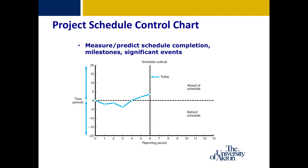Another tool used to track project progress, at least for schedules, is the Project Schedule Control Chart. The x-axis notes the reporting period being measured — in this case 13 periods shown. The y-axis notes the number of duration and time periods, which could be hours, days, or weeks — representing how far ahead or behind the project baseline the project is. The baseline is represented by a dotted line in the middle. Reporting periods behind schedule show up below the dotted line; those ahead of schedule show up above it.